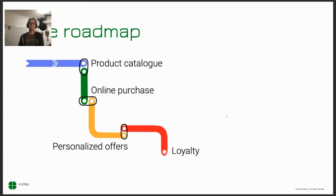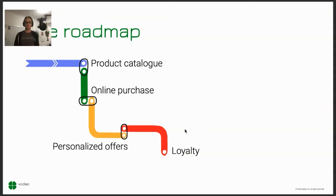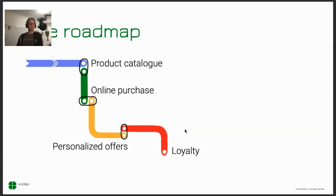Bill says that's great. The first release is a product catalog — you need a list of all products you're selling anyway, so why not provide that up front? Customers can see what's on offer and browse before online purchasing is even implemented. The next step would be enabling online purchasing — a buy button that results in a product delivered to your doorstep.